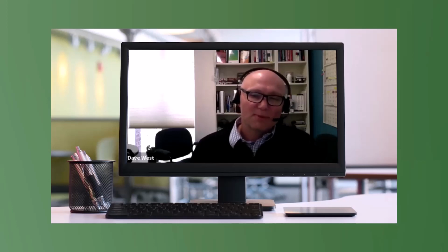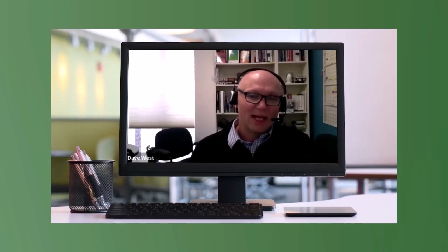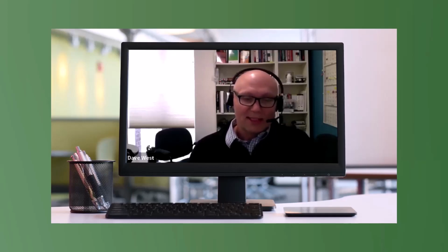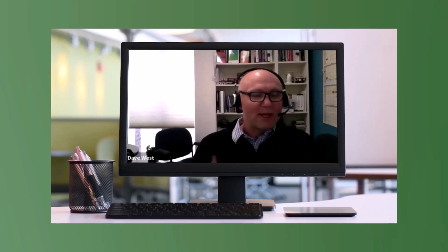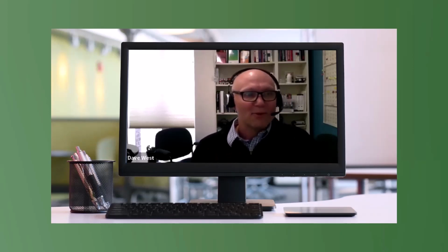Because one of the biggest problems, if you've got a product owner that isn't trusted by the management, the organization they're residing in, then they don't get that autonomy, they don't get that freedom to make the right choices. They're always second guessing. And so things like this happen where the team's like, hey, should we do this or this first? And they go, don't know, let me go and talk to some people, I'll get back to you. And that's awful for the team, for the product owner, for everything. The team will slowly lose trust in the product owner, but also more worryingly, they'll maybe be sitting around twiddling their fingers while they wait for a response.